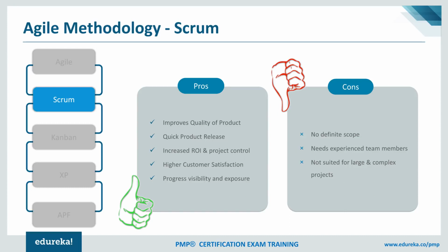Now, I would not have a complete idea about what's going to happen down the line, but at least for 2 to 3 sprints, I would know which stories I am going to pick up. So that much clarity should be there. There are uncertainties, because the reason why we are working in Scrum or Agile is that there are a lot of unknowns. You would not have full clarity of everything that you're building within the product, because the requirements are going to evolve as we go ahead sprint by sprint. But yes, you would certainly start doing the overall release planning in the beginning, and then you would have sprint planning happening as a part of every sprint as well.